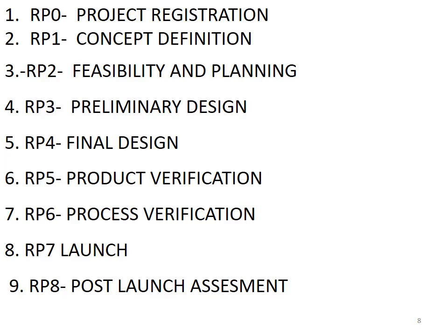build and test the alpha prototypes, assess the product failure, begin manufacturing process development. So at this stage, we have to also begin the manufacturing process development, conduct a preliminary manufacturing process review. Then we go for the final designs, detail and optimize the designs.